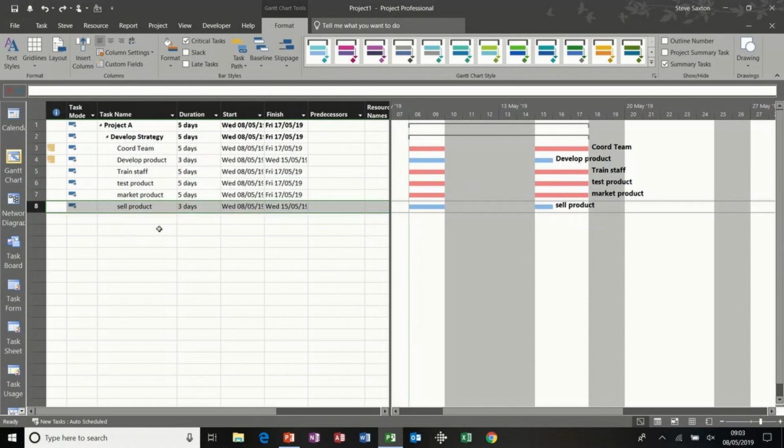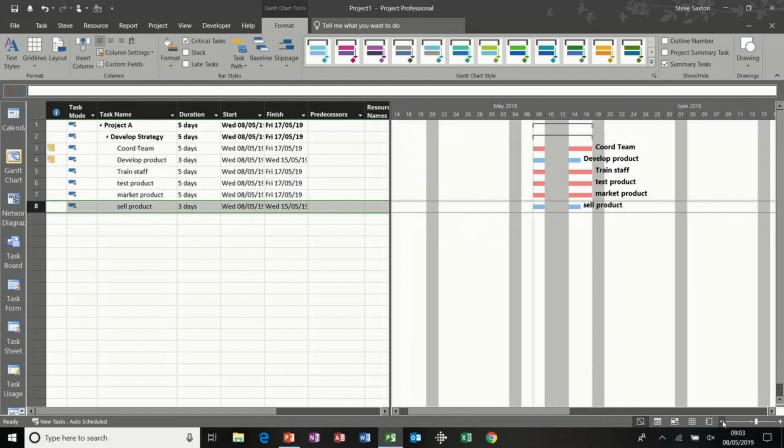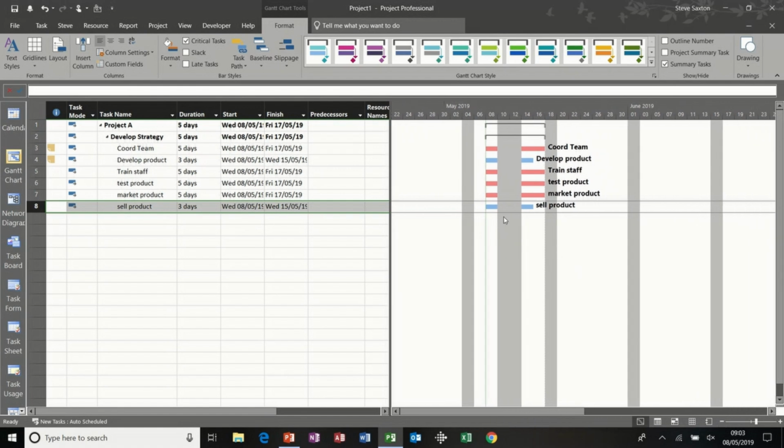Now on the Gantt chart itself, you can actually move tasks. So I'm just going to come down a little bit on there so you can see this better. If I sit my mouse on this task, I can push that forward and move it into next week. Now that's gone red because that is the only critical task. There's a gap there, so it's showing red. I'll just take that critical off for a minute.